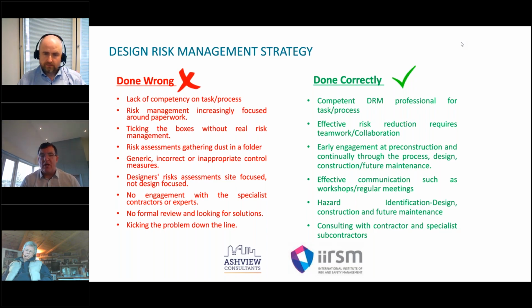Effective communication such as workshops, hazard identification through that process. Very important during our process that we can demonstrate elimination or mitigation of risk. So we're continually looking to evolve that cycle through the process, so that when we get to our milestones such as tender stage or procurement of main contractor, ourselves are not passing off a residual risk that ordinarily should be designed out, and that the contractor is, well, and I won't say accepting that risk, but then coming back to you saying ordinarily that risk should have been designed out during the process.